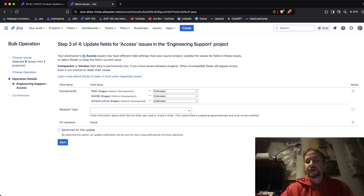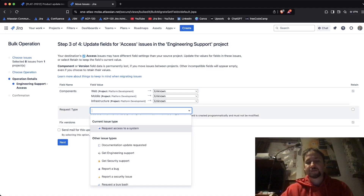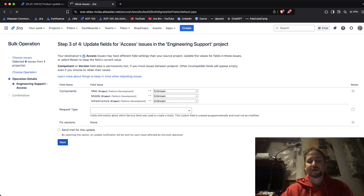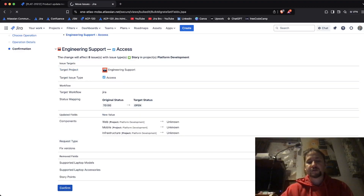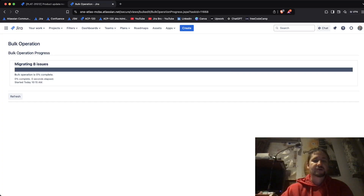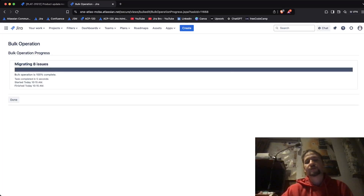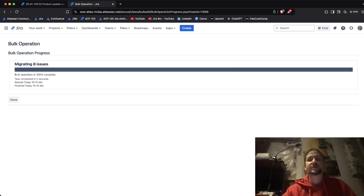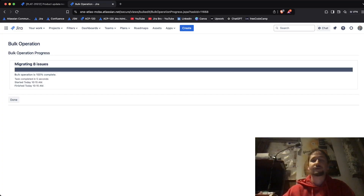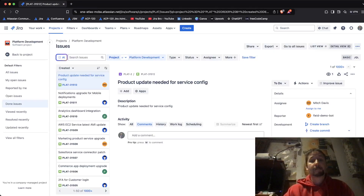You also have the option for request type. I'm going to say no and just click Next and confirm. When you're moving from software to service management it gets tricky because service management also has request types, and those request types are in dependency on their issue types — so that's another thing you need to look out for.